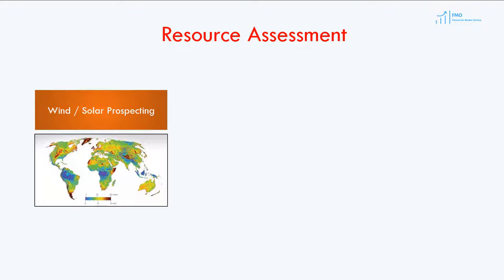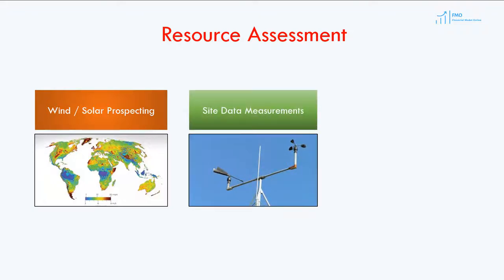At the second stage, the developer measures the wind speed or solar radiation at the site, typically for at least one year. Data is also collected from nearby long-term reference stations such as airports or weather stations for wind projects.